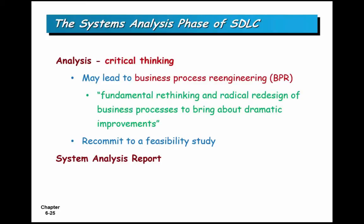BPR — business process re-engineering — is the fundamental rethinking and radical redesign of business processes to bring about dramatic improvements. Every project should include consideration for it. The challenge is to figure out how the business should be run and ensure it is done that way. At the end of the analysis phase, you do another feasibility study across all four categories, and you produce the systems analysis report, which describes what you want to do in human terms and becomes the input to the design phase.